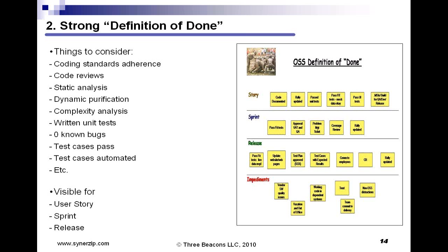Then, as you do the next project, take that existing definition of done and add one more item from this list to it. And then the next project, add one more item. If you'll do it that way, you will avoid the culture shock of, oh my gosh, all of this additional extra work to get a product out the door. And then you'll wake up 2 years from now and realize you've got a very strong definition of done. So this is a very common topic in Agile, called definition of done. Just make sure yours is very strong, and that will help prevent technical debt.